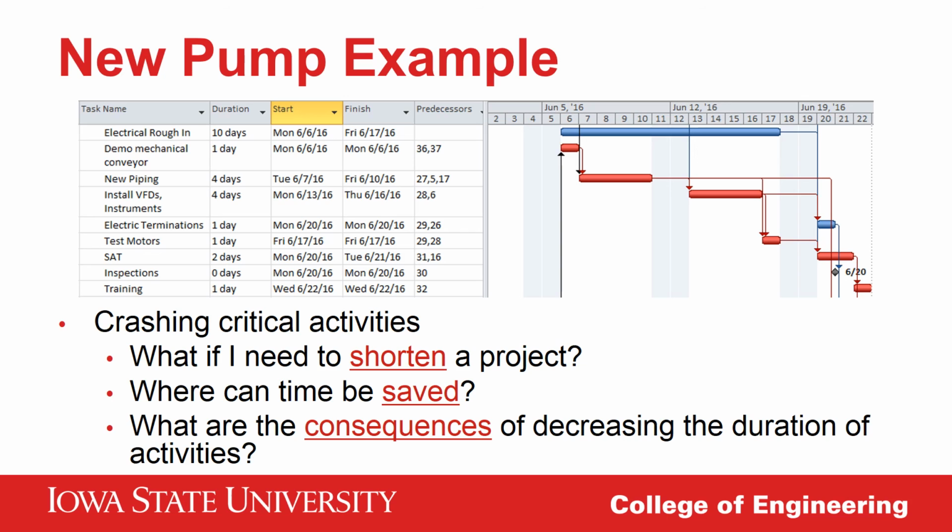I then looked at extending working hours from the contracted 1 10-hour shift each day to 2 12-hour shifts, working around the clock, shortening the remaining downtime even further. Each schedule improvement comes with a cost, and the costs are weighed against their respective gains. The best values are chosen first, and the decision becomes strictly algebraic. And that, my fellow engineering managers, is one simple example of how you can crash the critical path to shorten an event.